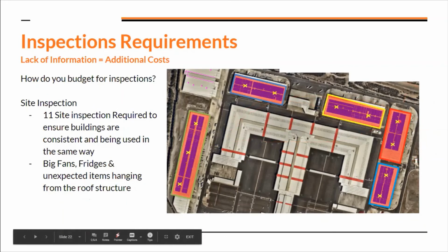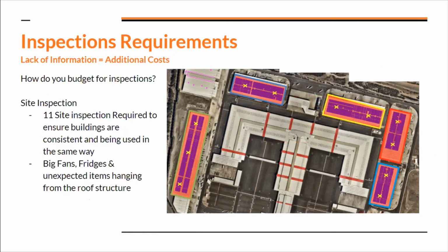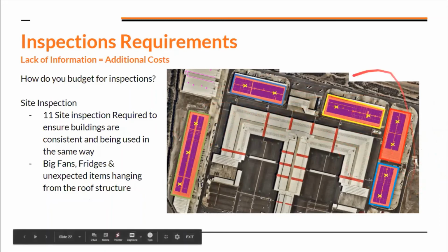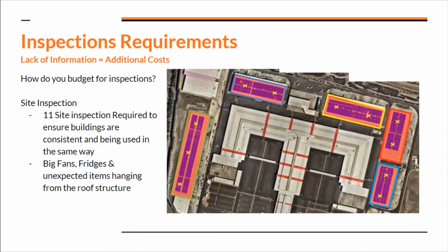And in my head, I'm thinking, great, that's fantastic. If that is the case, because if I design this one, which is probably the most critical, and these are the exact same and they're going to be less critical, then we could probably apply it throughout, right? And we could reduce cost on the assessment because they're the exact same. We don't need to assess it again. There are some factors like wind directions, but we can do quick checks on that. We don't have to charge the full amount of certifying 5 roof areas.